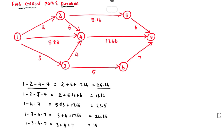So this is the critical path and this is the critical duration. We can draw a double line on it: 1→2, then 2→4, then 4→7. This is the critical path. In the critical path there is no float.